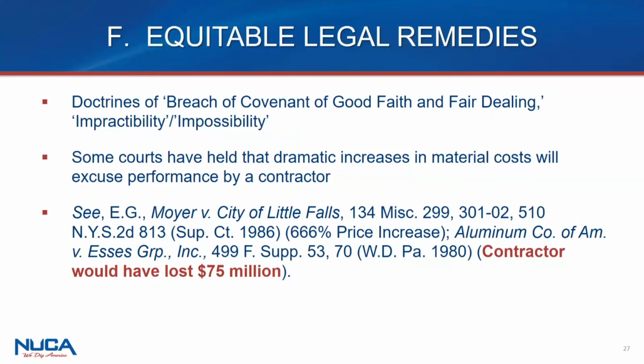Second comment I wanted to make is, if and to the extent you've got a material overrun, certainly in DOT specs, there's a right to material increase when you cross that threshold, whether it be 125% of the planned quantity. Recognize that to the extent you've got an overrun, you've got the basis for the amount above that threshold to seek payment for the additional costs associated with materials. So even if that material cost was known prior to the overrun, you have a right to request it.